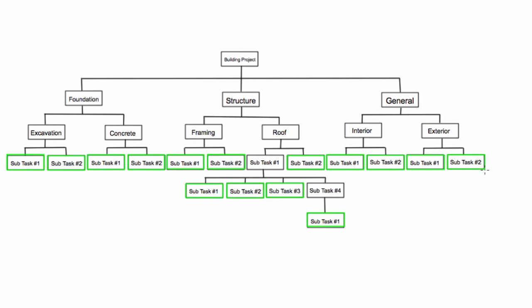These are what will become the activities in our Gantt charts and our network diagrams that we've been working with up until this point. Previously we had just been provided with a table of dependencies, but those activities on the table of dependencies actually come from a work breakdown structure.